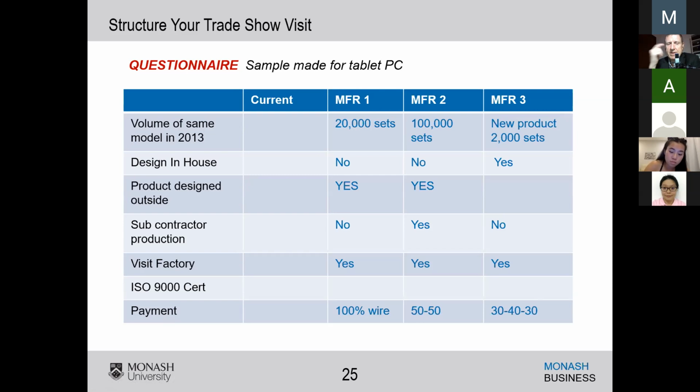And some of you are probably thinking, well, suppliers might just waste that money on some other manufacturing. Yes, they will. So then in the contract, you make it very, very specific that that initial deposit is to be used for the purchase of materials for your product. The 40% is normally at FOB, and then 30% is in your own port, like Malaysia or USA, Indonesia, India.